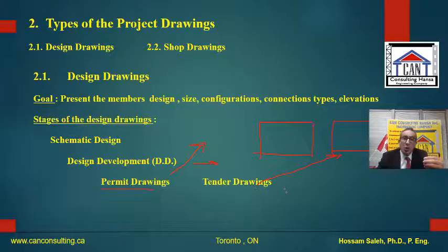And this drawing will be used for the tender. The tendering process will need maybe 8 weeks, depending on the size of the project. So we want to get the project to tender, and we are still not 100% complete with our drawing. So we are still designing and moving forward with our design.